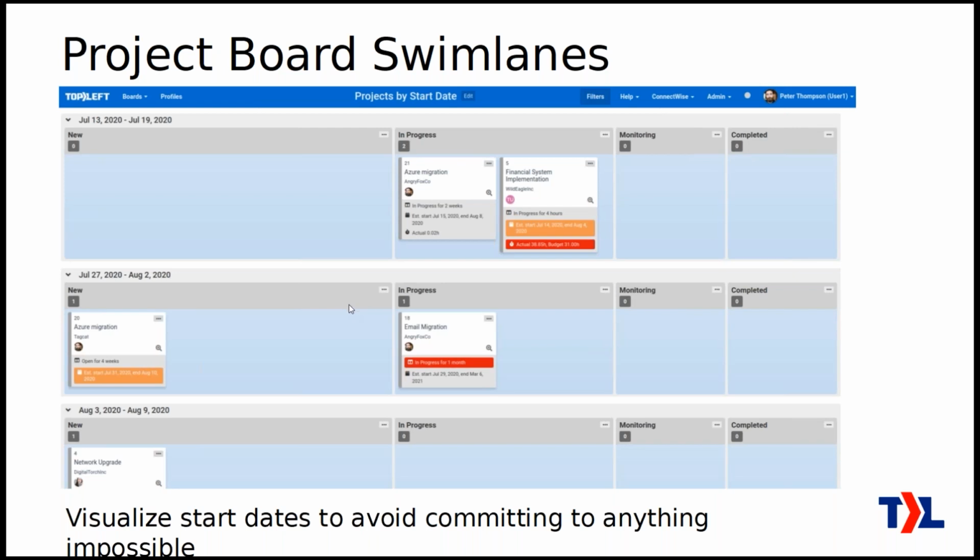say, we know that we can start 2 or 3 projects a week. And so assuming that these projects go according to plan, then hey, here's a salesperson, here's the week that we can start this project if you sell it right now. So that has historically been something that's been pretty hard to figure out using ConnectWise or Autotask, but with Kanban now, this can make this a lot easier.